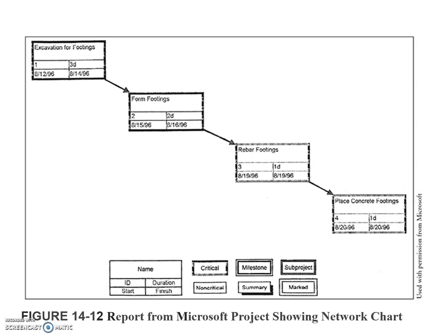Another helpful feature of most planning and scheduling software is an ability to use different calendars for different projects if needed. Calendars can be configured with holidays or other non-work days depending on project schedules.